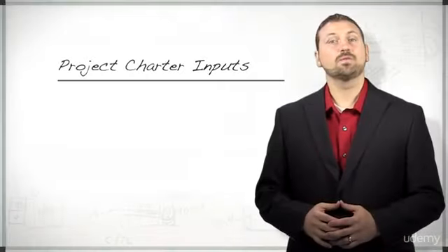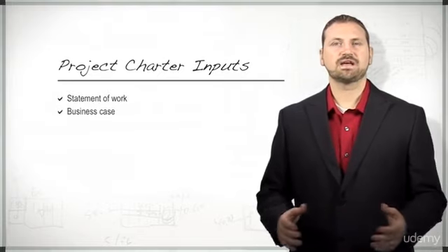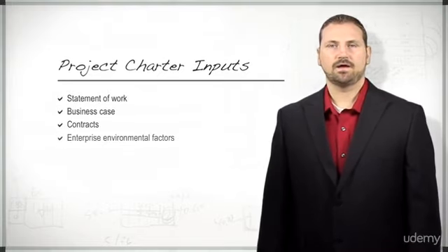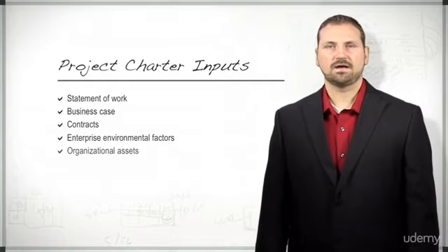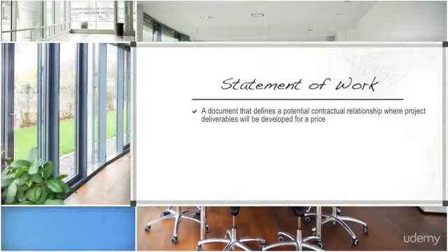The inputs for development of the project charter include the statement of work, business case, contracts, enterprise environmental factors, and organizational process assets. The statement of work is a document that defines a potential contractual relationship where project deliverables will be developed for a price.